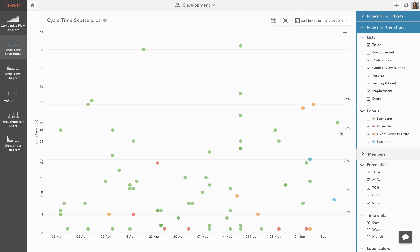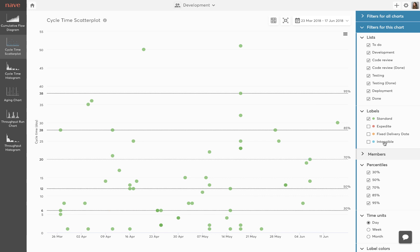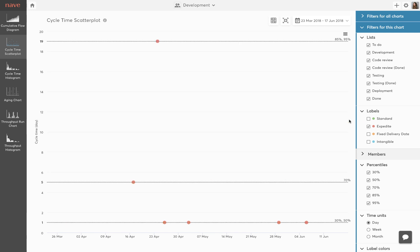Another great advantage of the cycle time scatterplot is that you can forecast cycle times for specific types of tasks. Simply filter by labels on the right to see the cycle times and the probabilities for the different types of tasks. This helps you keep track of how long your regular tasks are taking to complete, as opposed to urgent tasks and emergencies, for example.